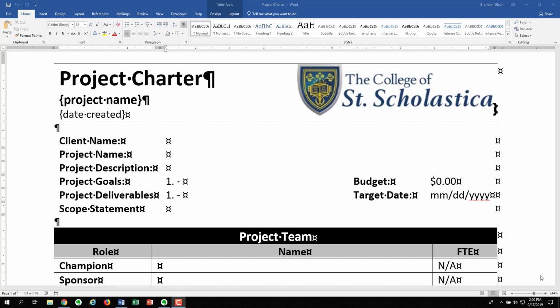The project charter is also used for organizations that have a steering committee to determine which projects will be funded or which projects will be supported in the organization. Each project creates this project charter, and the charters are evaluated and those that are going to move forward are selected, based off the information in this standard project charter. So it's a little bit of background on the project charter.